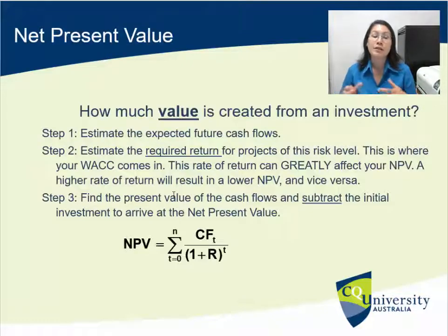Net present value tells us how much value is going to be created from proceeding with this investment. Now, there's two main points in net present value. There's present value and then there's net present value, and I'll go through that in the next slide. Firstly, step one is estimate all of our expected future cash flows. And in practice, that's the hardest thing to do. Actually forecasting accurate cash flows over the life of the project is very hard to do. When you study business finance later on, you'll see how we actually forecast those cash flows and start to see some of the complexity that can be involved.